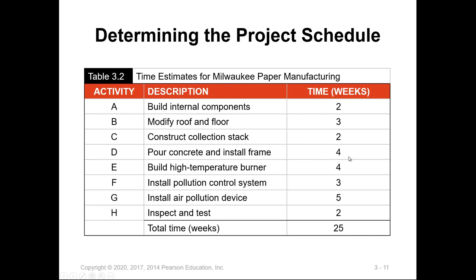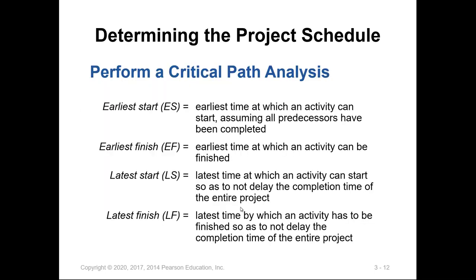If you just add the duration for each activity — say two weeks for A, three weeks for B, and so on — it might total 25 weeks. But this is not the right approach. With the sequence of activities and using the critical path method, we will get a different length for the project duration. There are also other terms that need to be defined in a critical path analysis to understand how to proceed.